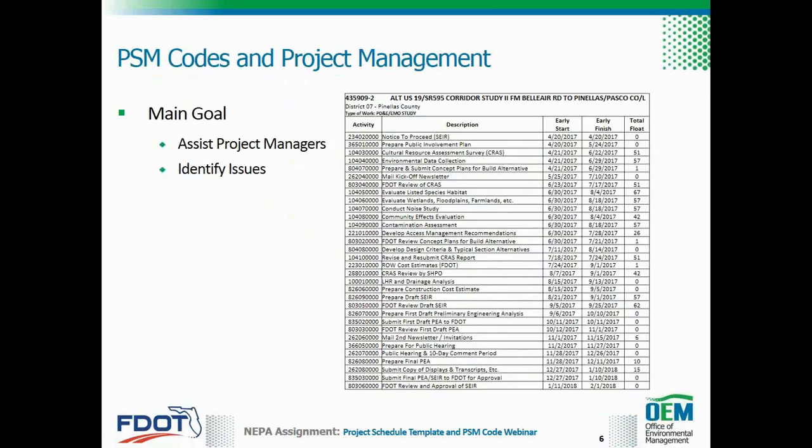So why are PSM codes important? PSM codes can assist with project management. A PD&E study may consist of hundreds of activities, but only the major activities are assigned a PSM code. So a quick glance at the schedule can help identify the major milestones within the study. But the most important attribute is that you can develop relationships between the different activities assigned a PSM code.